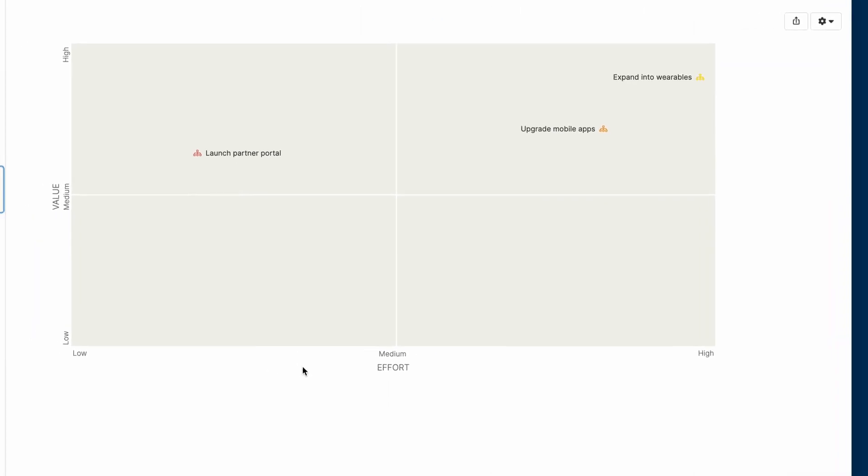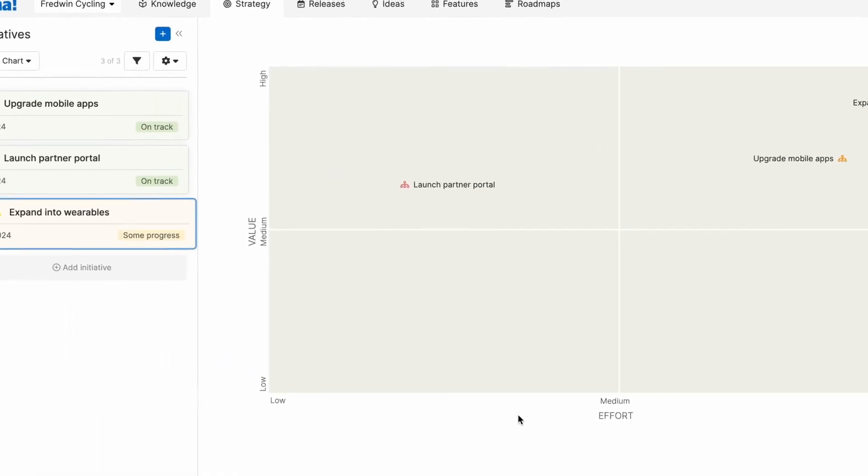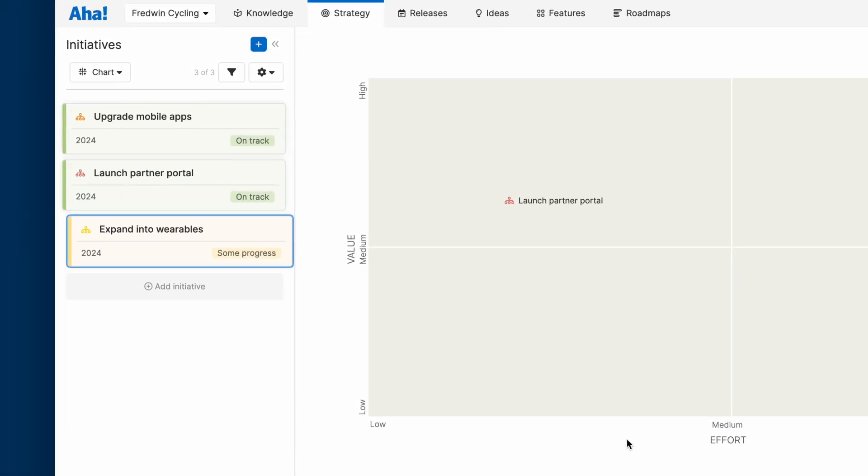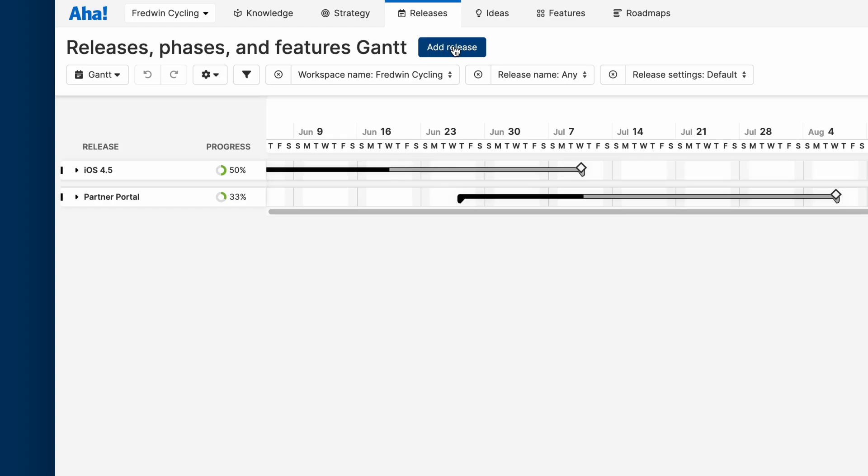Now that your strategy is set, it's time to plan exactly what you want to build and when. Schedule releases to plan when you will launch new customer experiences. For major releases, we recommend creating a Gantt chart.